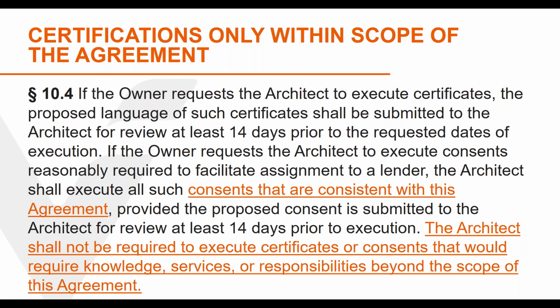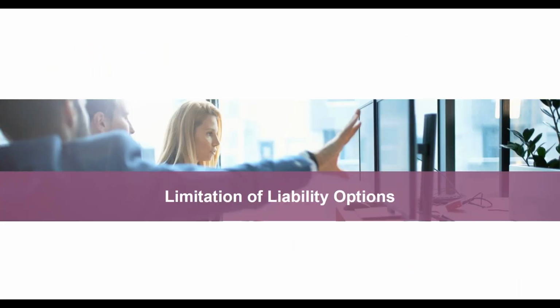scope of the agreement. Part of the reasoning for this is that a broader certification would violate registration laws that require a design professional to only provide services within the professional's competency. So limiting certifications is extremely valuable, and that last line should be in every contract.